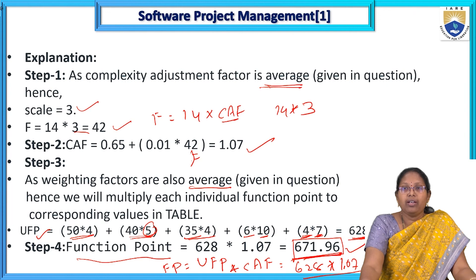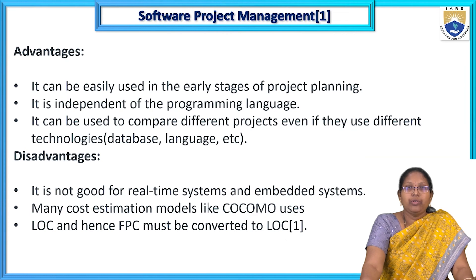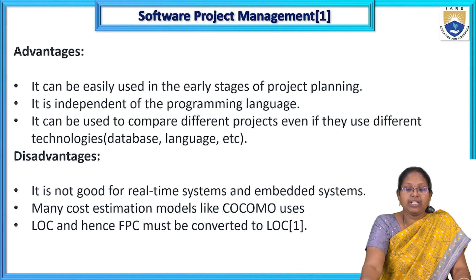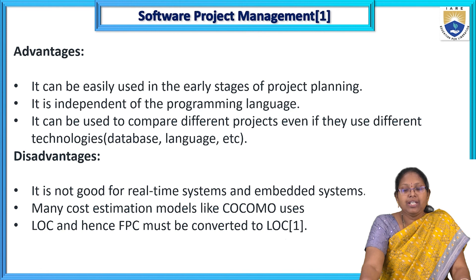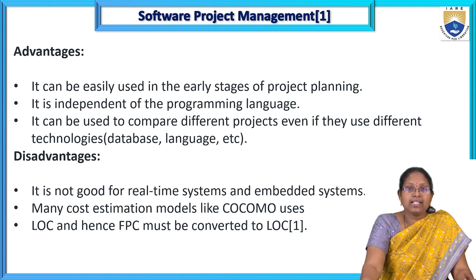Advantages of functional point analysis: it can be easily used in the early stages of software project planning, it is independent of the programming language, and it can also be used to compare different projects even when they use different technologies such as databases and languages.